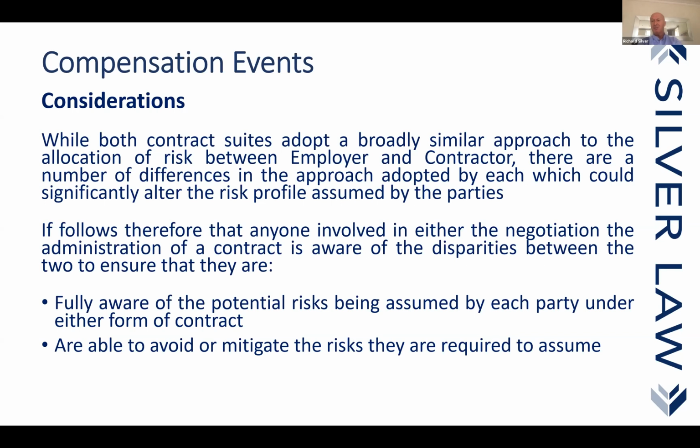But we're not talking about a contractual entitlement. And what that individual is talking about is a contractual situation where it's part of the contractual documents. So there wouldn't be a right for misrepresentation because there isn't any misrepresentation. What the contract says is this is the employer's requirements. We're not representing it's right or otherwise. What we're saying is this is the base design. What you now need to do is to develop and complete that design, which would include any errors in that design.